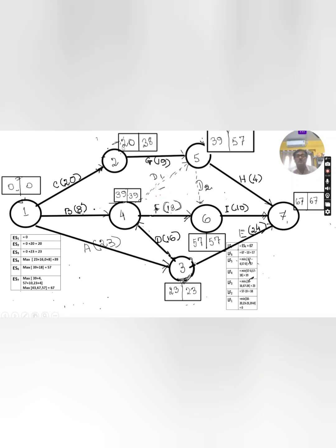The earliest start time here is 20, and 19 days is required to complete this activity. 20 plus 19 means 39. And if you take this route, then the earliest start time is 39 and the time required for the dummy activity is 0. Again it is 39. Both are the same. That's why the earliest start time is 39. You can check it. Yes, 5, 39.